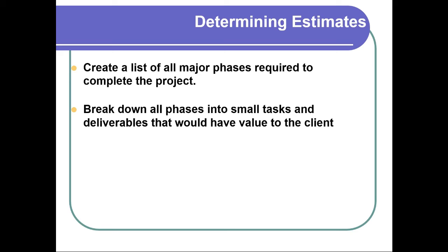I would break that down into small tasks, and maybe I'd charge the client for creation of the survey. Maybe I'd charge a client for the process of analyzing the survey. Maybe I'd charge the client for the survey report, right? All of those are billable to the client because it's taking my time, my company's time, to do that analysis. So you wouldn't charge them for each individual question, although I guess you could, but that would be quite the small breakdown. So basically what you do is, creating a survey for audience analysis. Boom, you're done.